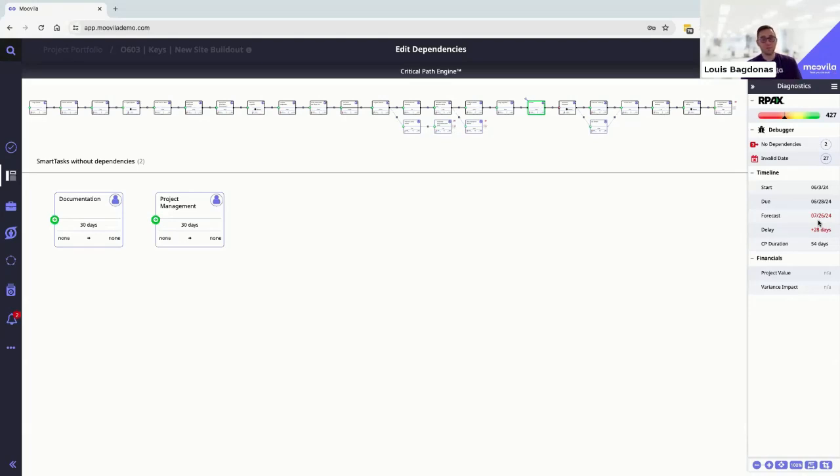If we can't start until June, right, then we're not going to be able to finish until the end of July. Is it okay if we start this in May, right? Because if we start in May, we can finish in July. Maybe customer says, oh yeah, that's fine. I just thought we wanted to get it done in 1 month. If it's going to take that long, great. Hopefully they're flexible. Maybe if they're not, that leads to a different conversation. But we have the tool here to tie everything together.